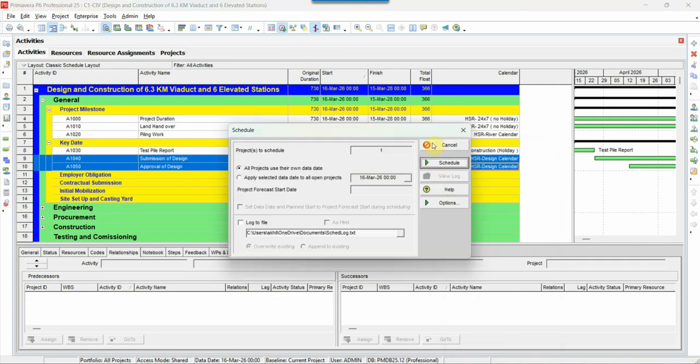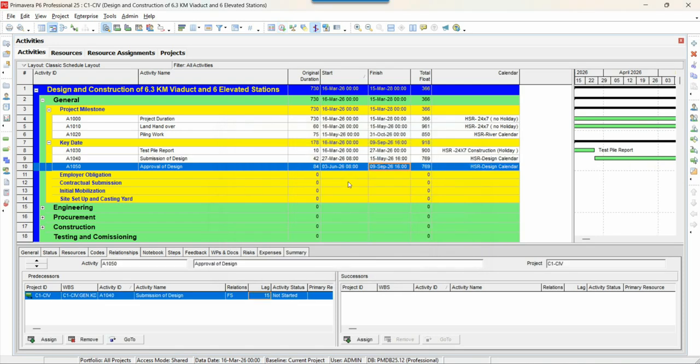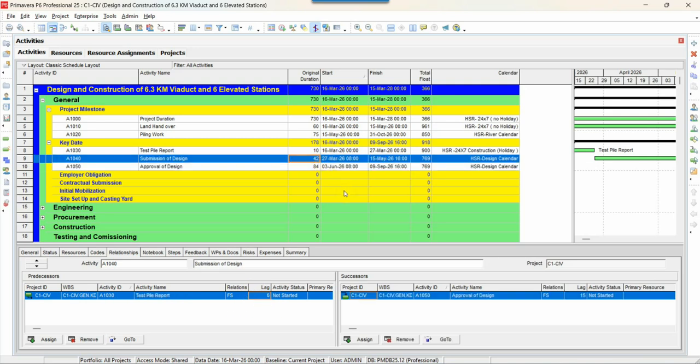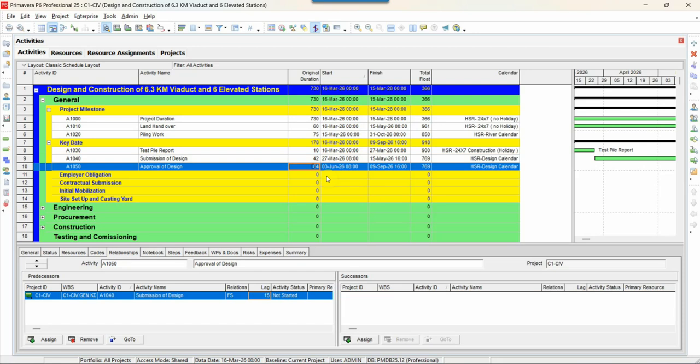Now if we schedule it, you can find the difference. Here the float of 5 days is converted into 15, 14 days duration converts into 42, and 28 days duration becomes 84. So this is the impact of a change of calendar once your program gets submitted. This is only two activities you can identify easily, but your program has thousands of activities for the design. So it is very difficult to manage and reduce this duration.